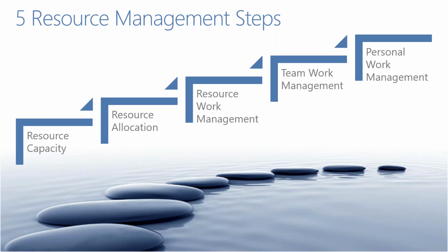Resource capacity is often done at a very high level, on a role basis, on an FTE basis per project, and be able to just have a sanity check to see, do we have the resources and those types of resources available in general, and do we in general have a capability to deliver based upon the requests that are being made. And the idea is that organizations can start there because it's something that they can actually get their people on board with, get them trained, and from just a process rigor perspective, be able to sustain it.